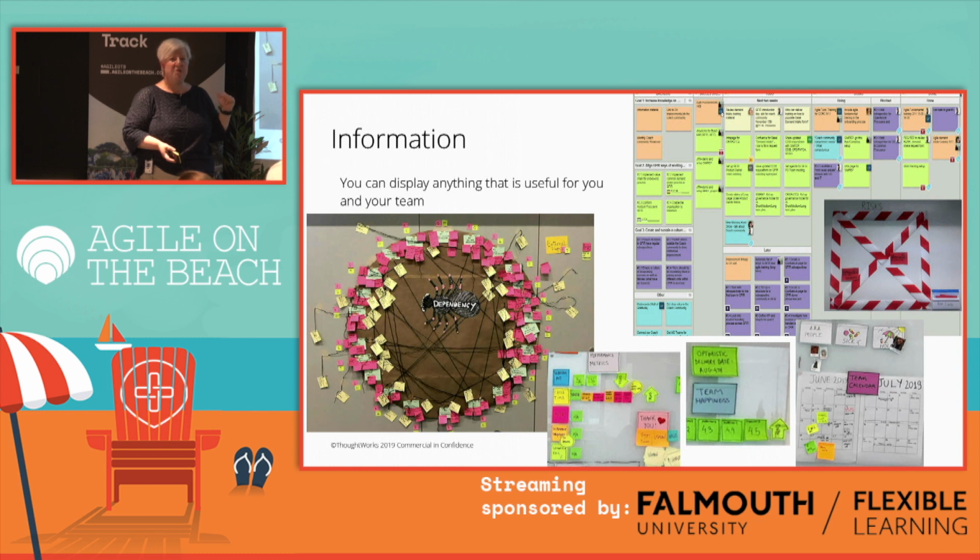Everybody wants to know when something's likely to be delivered, but we managed expectations around it by saying it was an optimistic one. And then just at the back there, we've got a team calendar and who's out. Who's off sick, who's maybe out on holiday, just for capacity planning purposes so that we know where everybody is. So lots of different kinds of information there.